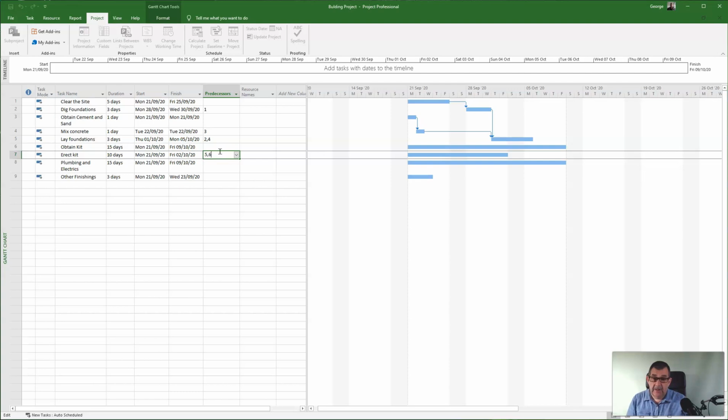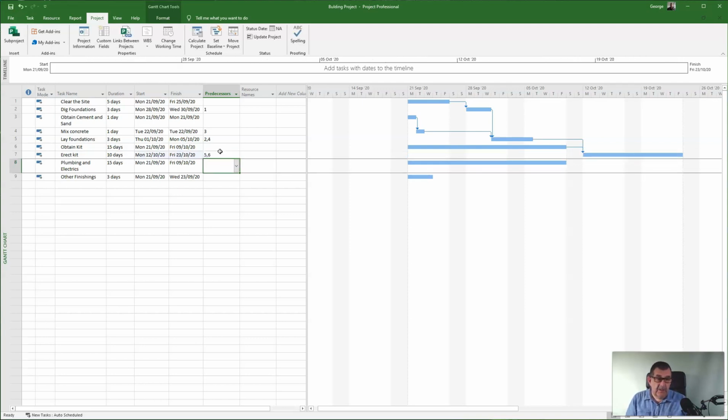The kit's got to have arrived on site. So I've got 5 and 6 as the predecessors of this one. So let's do that.